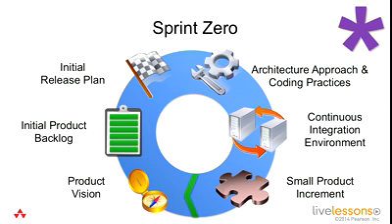That's why I recommend a sprint zero. Only use it if you need it. And if you do implement one, make it no longer than a normal sprint because that way you can't sit around and plan indefinitely until you think you're ready because you're never going to be ready. Get enough to start that first sprint and move forward.